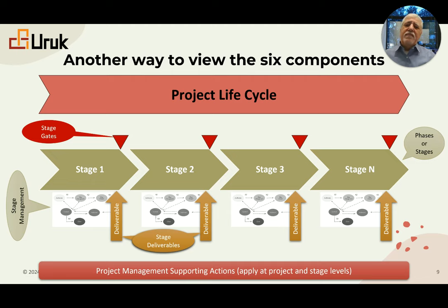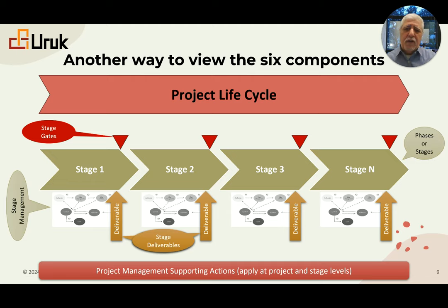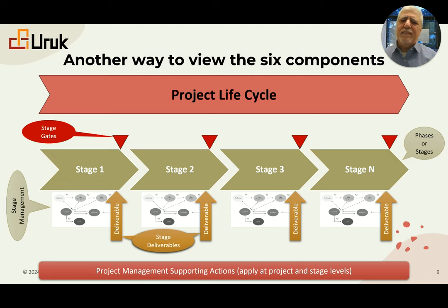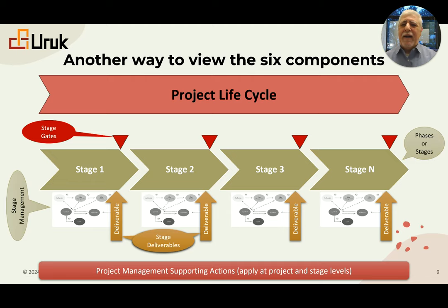When it comes to the mechanics of what a project management method should be, regardless of the environment, it should have something like this. This doesn't mean fixed, set in stone — it's the standard model of CAMP. From this model, we can modify. We start with a vision for the product or service. For a project owner, this starts at gate zero, while a contractor's gate zero might correspond to gate four or five in the client's model.